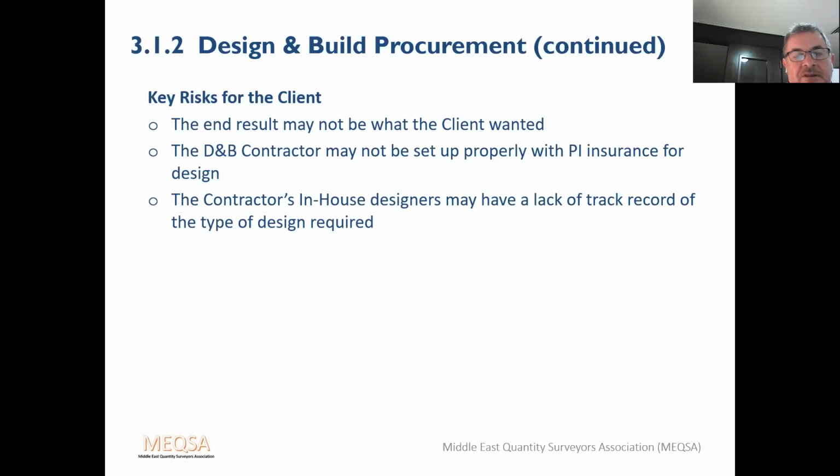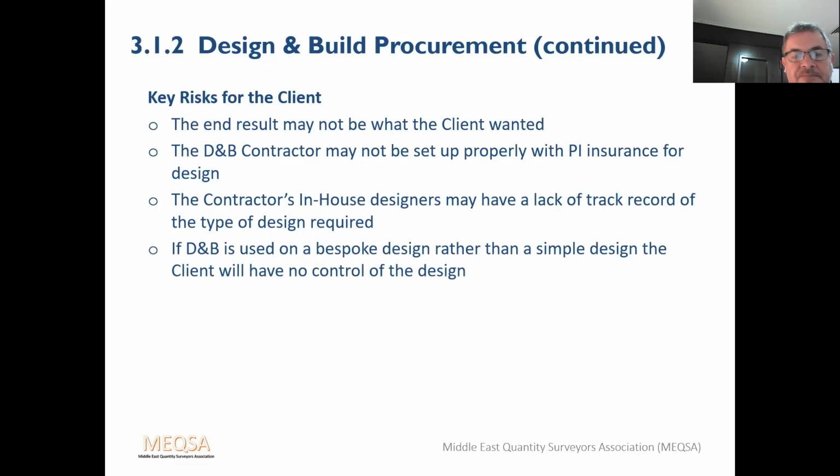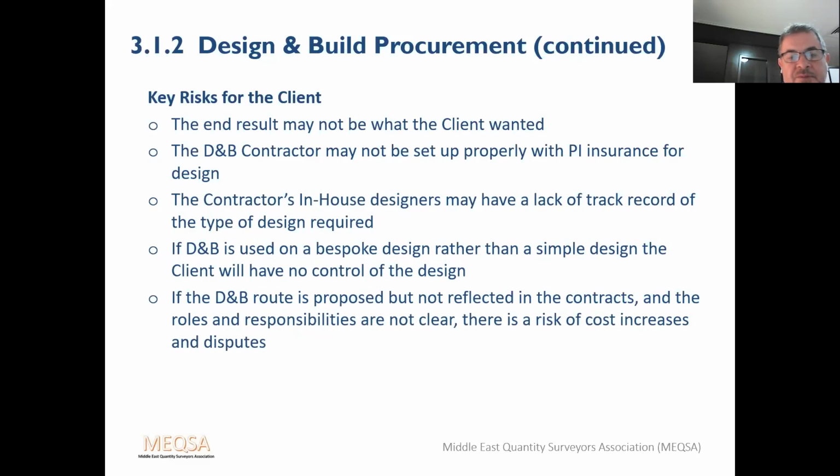Contractors and in-house designers may have a lack of track record of the type of design required. Again, due diligence, that should be checked out before they're appointed. If D&B is used on a bespoke design rather than a simple design, the client will have no control of the design. That's what we spoke about. If the D&B route is proposed but not reflected in the contracts and the roles and responsibilities are not clear, there's a risk of cost increases and disputes. Again, due diligence when forming a contract.